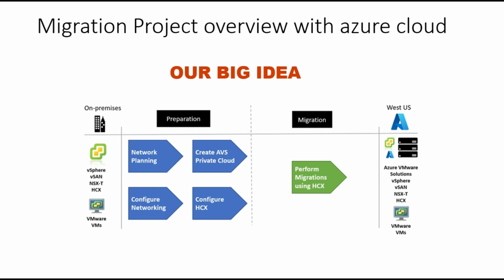Server and complete, for example, it's a Java-based application, which means we need to set up some software on the server side, like the PHP version or Java or Tomcat. I mean web servers like Nginx or Apache as the front end, or Tomcat as the backend. Any libraries, like worker properties libraries and all those kinds of things, we need to set up two days before. Then on the downtime window, we will migrate all the data within 1 hour.